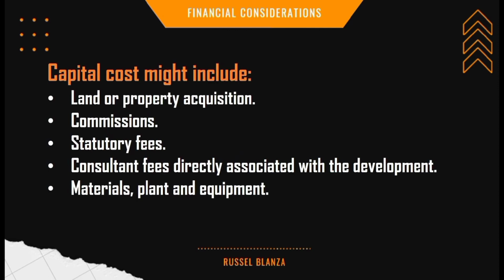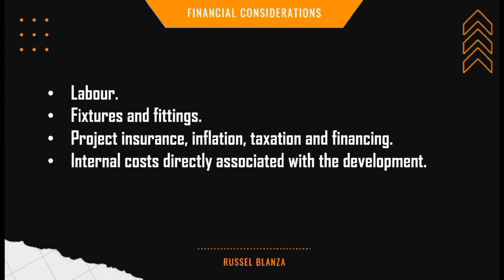The capital cost of developments can include land or property acquisition, commissions, statutory fees, consultant fees directly associated with the development, materials, plant and equipment, labor, fixtures and fittings, project insurance, inflation, taxation and financing, and the internal costs directly associated with the development.